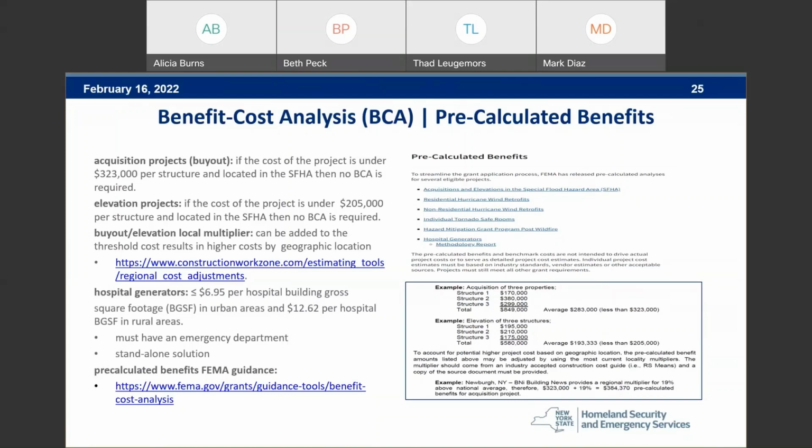Right. So the other consideration, and again, it's for you guys to think about, is that the FEMA process is such that we will get these things to FEMA as quickly as we can. But the current deadline to FEMA is the end of the year, and then they will answer them as quickly as possible. And there's a state contracting process that typically takes about 90 days. So again, I think the county could manage all those things, and if it works for you, great. But I just want to be real about how quickly these funds make their way through the federal government to the locals.